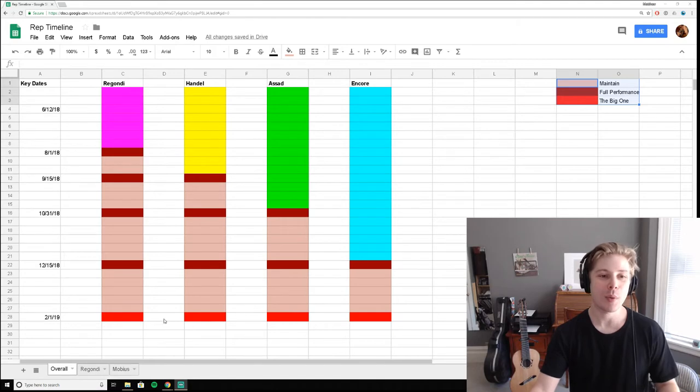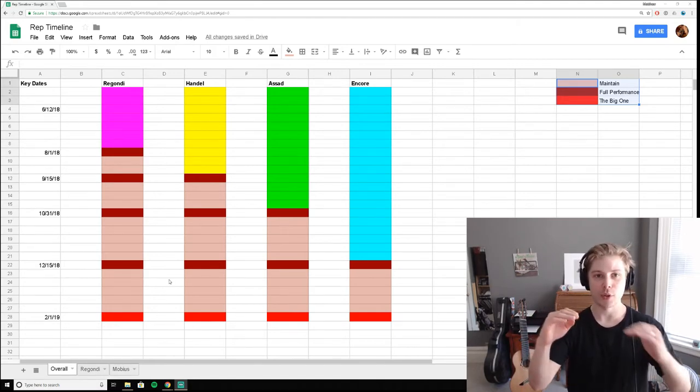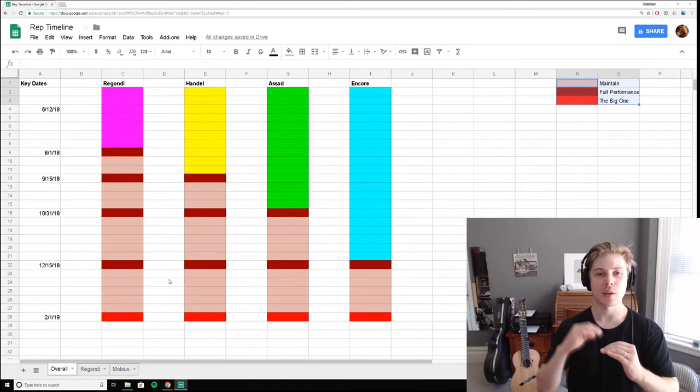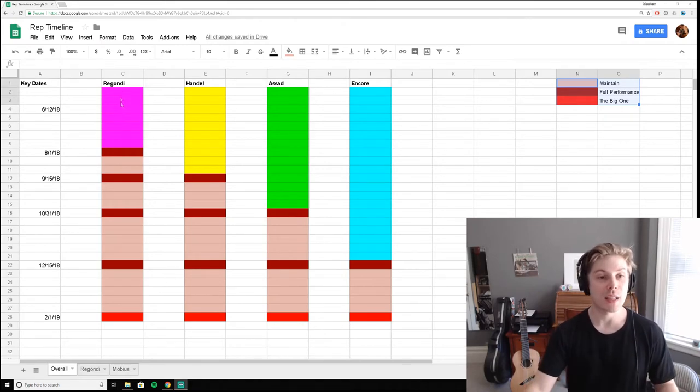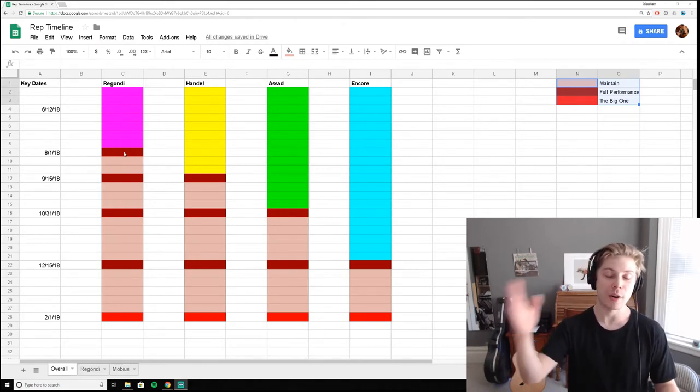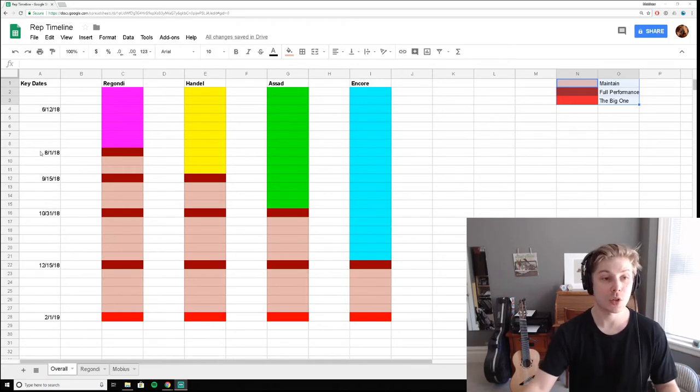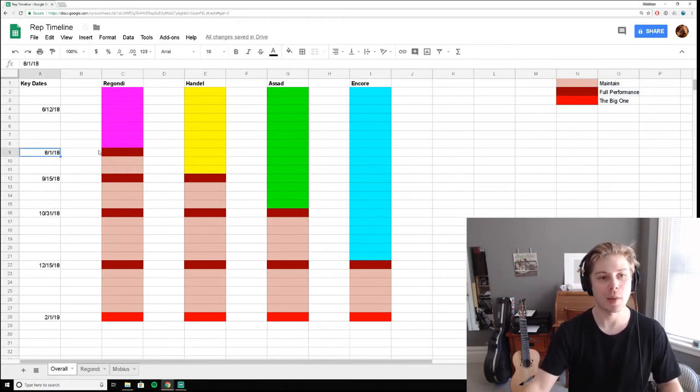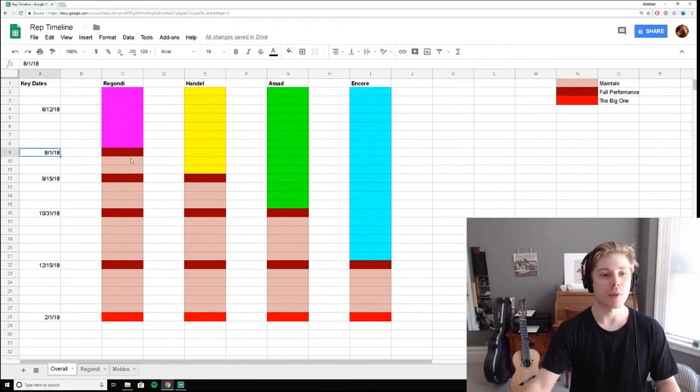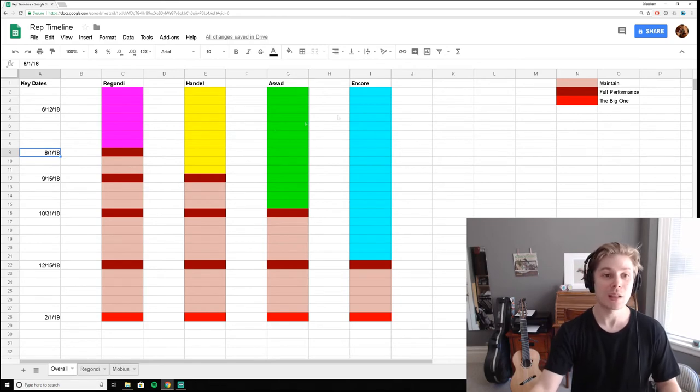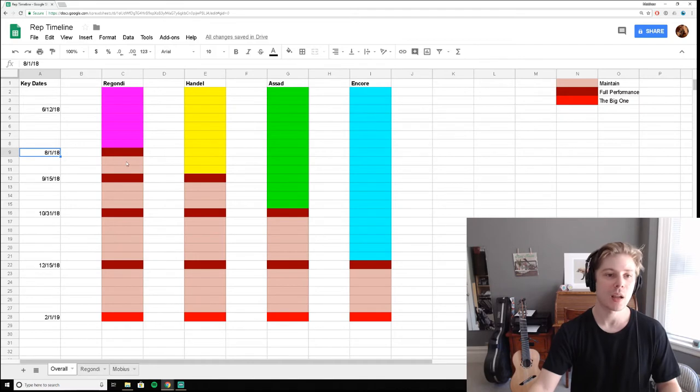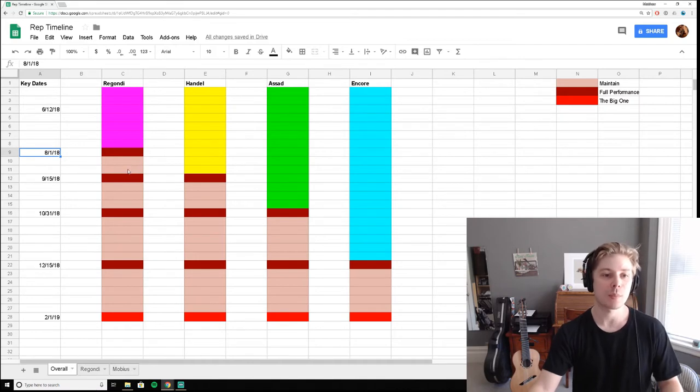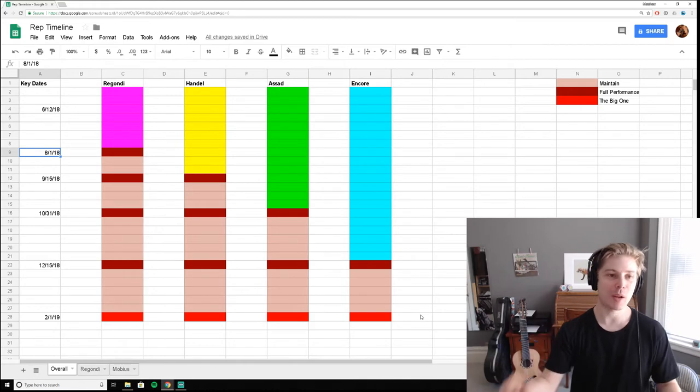But what I wanted to do was to create signpost performances along the way so that, for instance, I could get one piece, the piece that's the farthest along now, ready the soonest in about a month and a half, do a practice performance, and then after that, it's in maintenance mode. So the dark red is performances, the light pink is maintenance, and then the really deep scarlet is the big one.